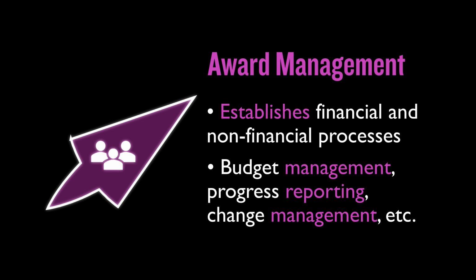Functions like project budget establishment and management, progress reporting requirements, and change management like sponsor requests to extend time to complete the project or no-cost extensions, or even rebudgeting from one budget category to another are all parts of post-award.